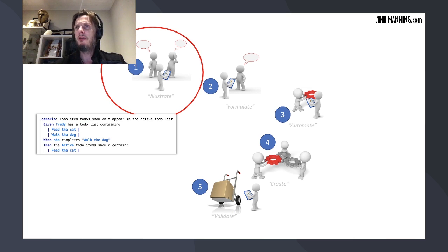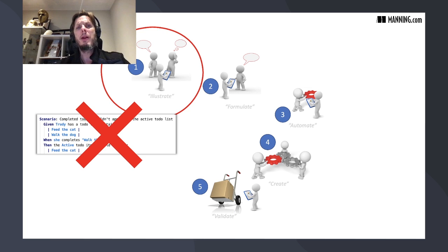It takes a lot of time to refine that, and you end up doing a lot of back and forth to get that right. But this is not a good use of a product owner's time. What will happen is if a product owner is focusing on writing out given when thens, they'll lose track of what actually matters, which is the examples and the business rules. So what we really want is not to use given when then statements in what we call the three amigos conversation, because it distracts them, because they focus too much on should it be a when or an and then, and not enough on did I remember all the edge cases and all the acceptance criteria, all the business rules that are important, all the outcomes that we're looking for.